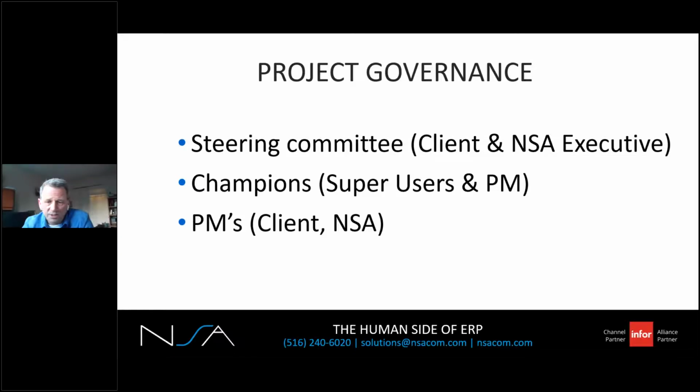Overall, the required frequency to meet will ebb and flow with the project, sometimes monthly, other times daily. And your PMs will gauge what's required and adjust as they go throughout the project. My preference is to pre-schedule the meetings, and if all is good, cancel them. It's a lot harder to get people's time at the last minute when things are on fire.